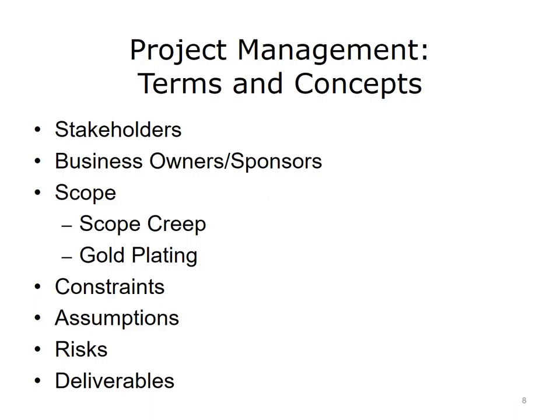Scope is considered one of the recognized project constraints, which also includes schedule and funding. Constraints are things that might restrict, limit, or regulate the project. Often at the beginning of a project, all details are not clarified. To protect yourself from the myriad of unknowns, it is important to clearly communicate scope with your constraints, knowns, and assumptions — unknowns. An assumption is a belief based on what you assume will be true in the future. Your original scope is based, to an extent, on a belief regarding things that are not in your control, and if that belief changes as the project progresses, this could impact your scope and potentially impact your constraints.